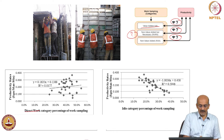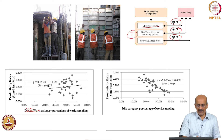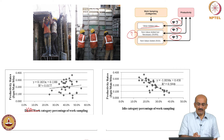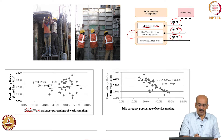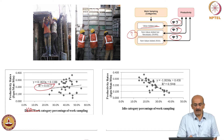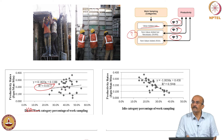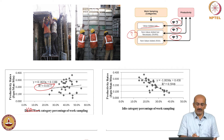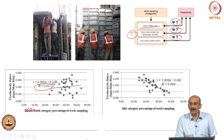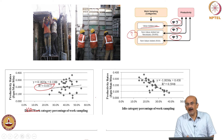So direct work is actually value added in work sampling. You can see that as value added increased, the dots show the actual productivity measurement and the line shows the best fit. The R-square shows the coefficient of regression. What do you think of this R? Not very good. We were not able to establish a strong correlation between direct work increase and productivity.